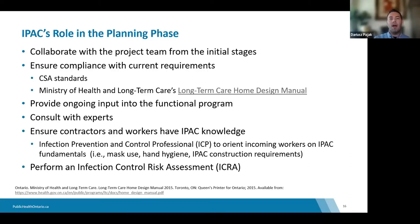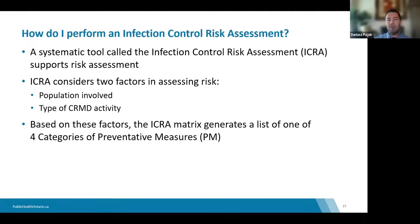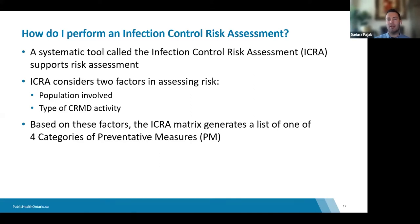How does one perform a risk assessment? Luckily, assessing risk is a lot less involved than you may think. There is a risk assessment tool called the ICRA — Infection Control Risk Assessment. This tool essentially considers two factors: the population where the work is occurring, and the type of work being undertaken. Cross-referencing these two factors generates a preventive measure category, and for each category there is a list of requirements to guide next steps.